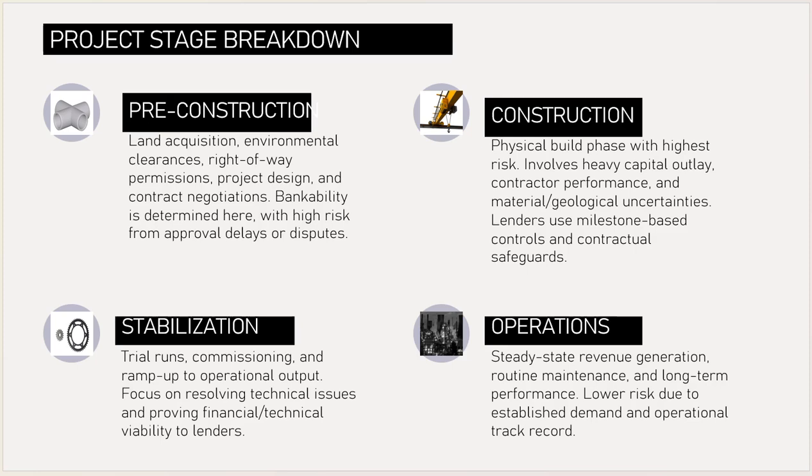The pre-construction stage typically involves land acquisition, environmental clearance, right of way permission, project design finalization, and the negotiation of the concession agreement and long-term offtake contract. This phase largely determines the project's bankability, as delays in approvals and land acquisition can extend the timeline before physical work begins.